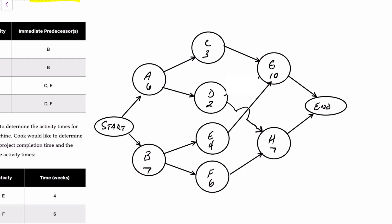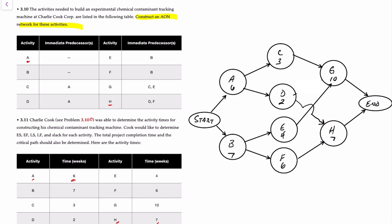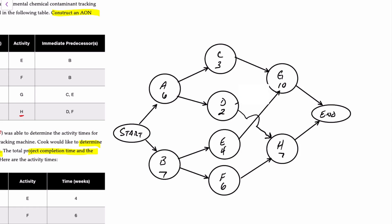That solves the requirement for problem 3.10. After putting in the activity times, our second objective is to determine the earliest start and earliest finish times, also known as ES and EF, and the latest start and latest finish times, also known as LS and LF for each activity, as well as the slack. We'll also determine the project completion time and the critical path. In order to figure out the earliest start and finish times, we can do something called a forward pass.